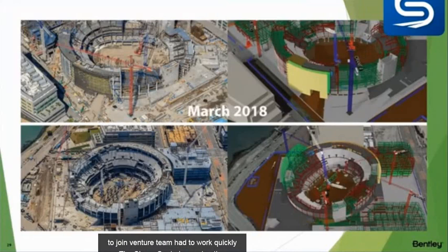The Chase Center's construction schedule involved more than 36,900 individual tasks and over 92,800 relationships. Being able to modify the schedule, adding child tasks, linking them as a chain and updating easily was extremely important to them.